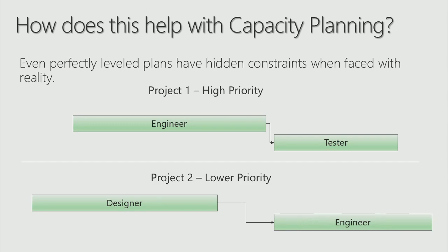It expected the engineer to be available earlier, but now it's available later, sometime down the road, and now I've got a delay. Either a delay in the start of that task in project 2, or maybe I was able to get some engineering resources, but not all I needed. So I was able to start doing my engineering on project 2, but it's going to take longer.